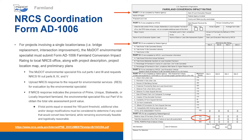If total points equal or exceed the 160-point threshold, additional sites and/or design modifications must be considered to determine if any exist that would convert less farmland, while remaining economically feasible and logistically reasonable. If the value equals or exceeds 160, alternative design considerations should be made to avoid or minimize impacts to farmland resources. In that case, the MoDOT Environmental Specialist will also complete part 7 and submit the form back to NRCS for its records. The Environmental Specialist will upload the NRCS response to the RES.